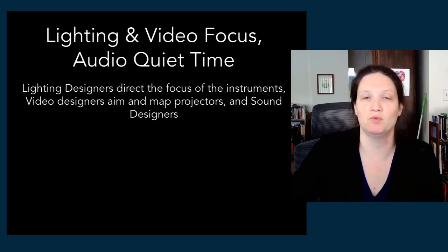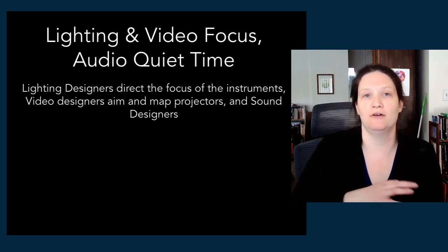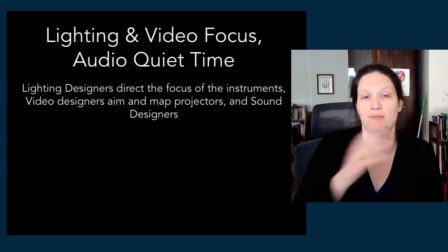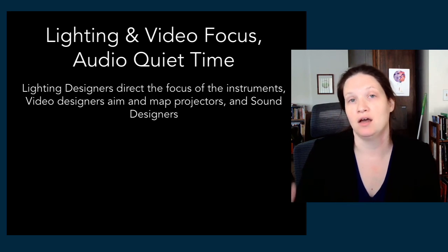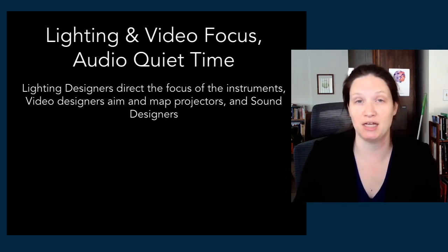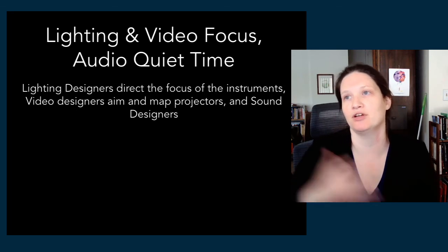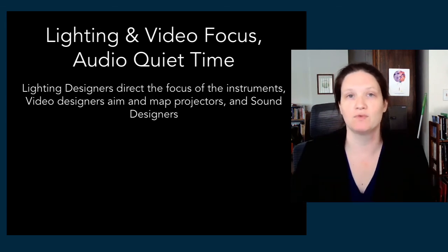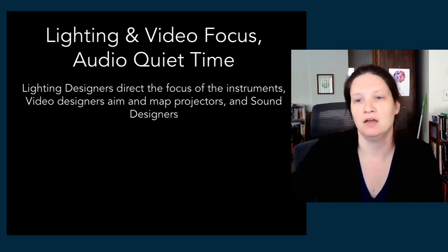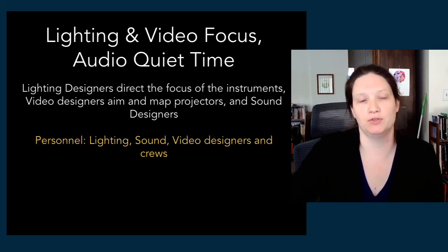Your sound design team will also have a focus, typically, right, where they will come in and point speakers where they go, and then they'll have some period of quiet time where no other work is happening in the space so that they can set preliminary levels, get everything organized before tech so that they don't come in and every sound cue is 10,000 decibels that blows everybody's ears off. They're able to get some of their stuff roughed in the physical space. So this includes lighting, sound, video designers and their crews.